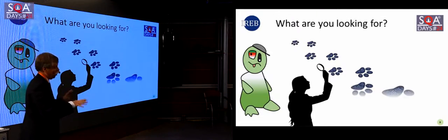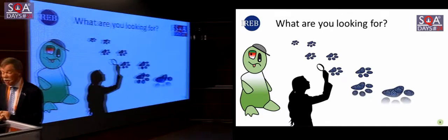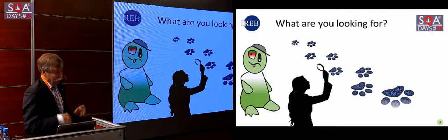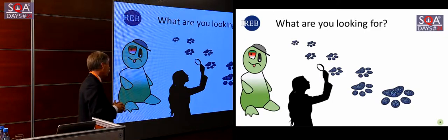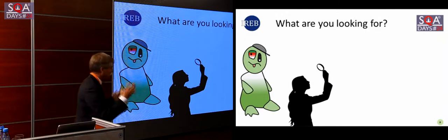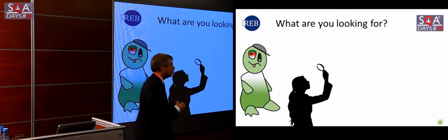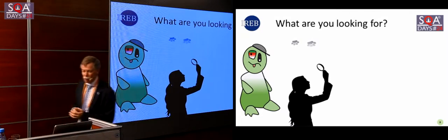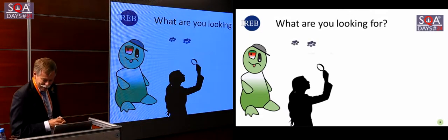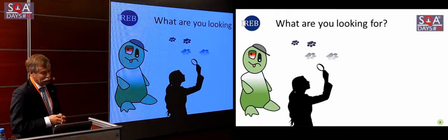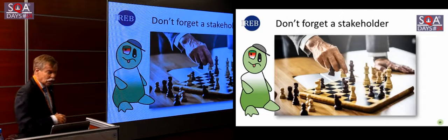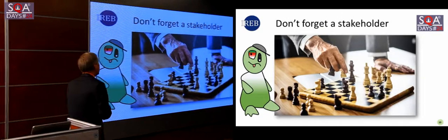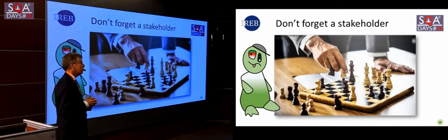Eventually it went fine, but it was a great problem, and of course we didn't plan for it, so we had to work extra, and we passed our budget. We had already passed our budget, so that was not a great problem in a municipality the size of Rotterdam, but still we were not very happy. That's also an ugly requirement.